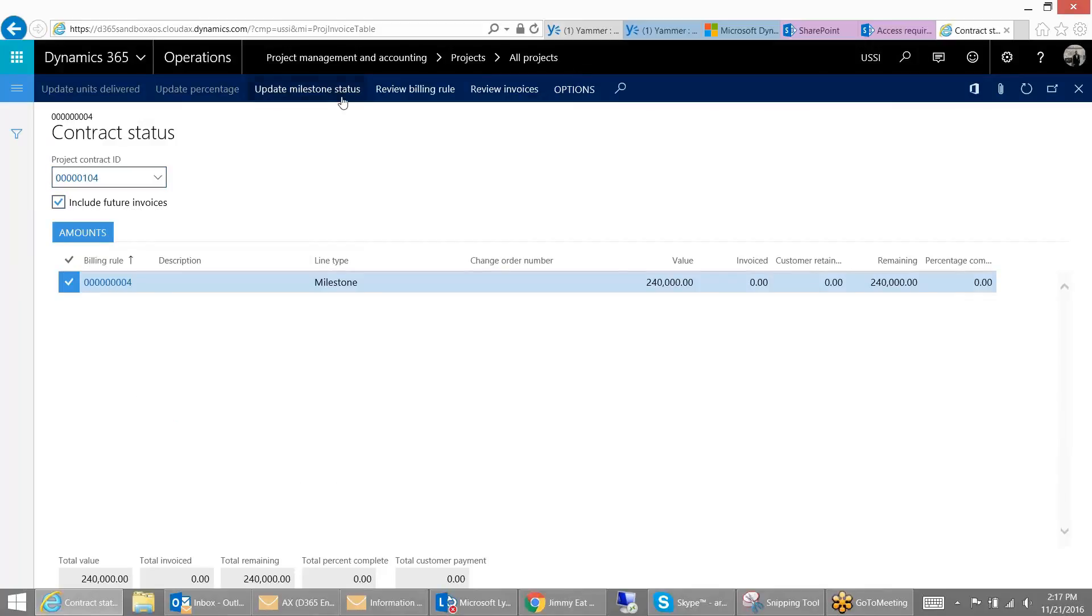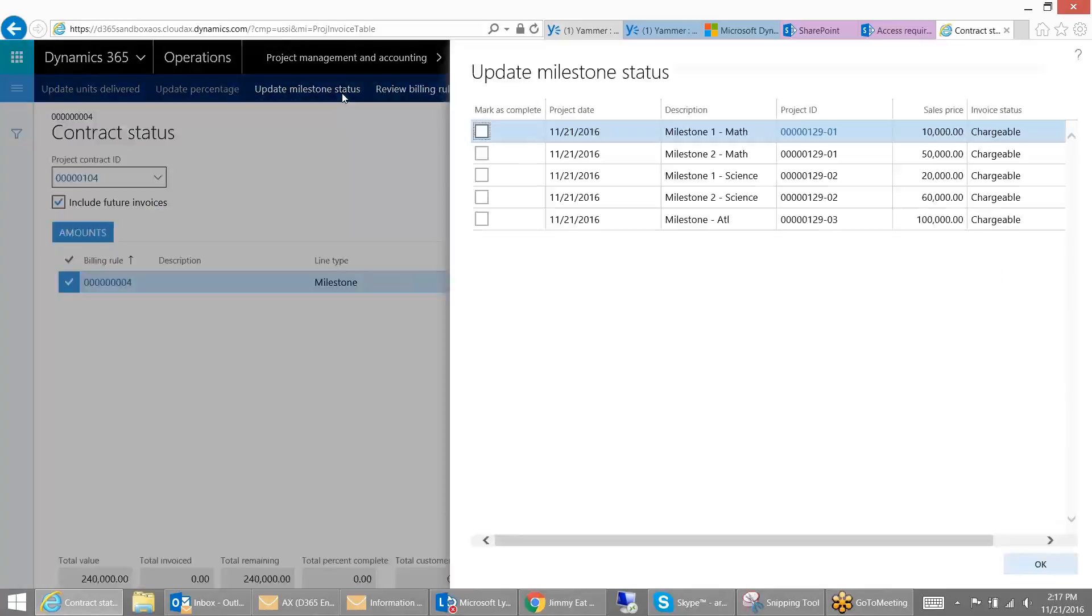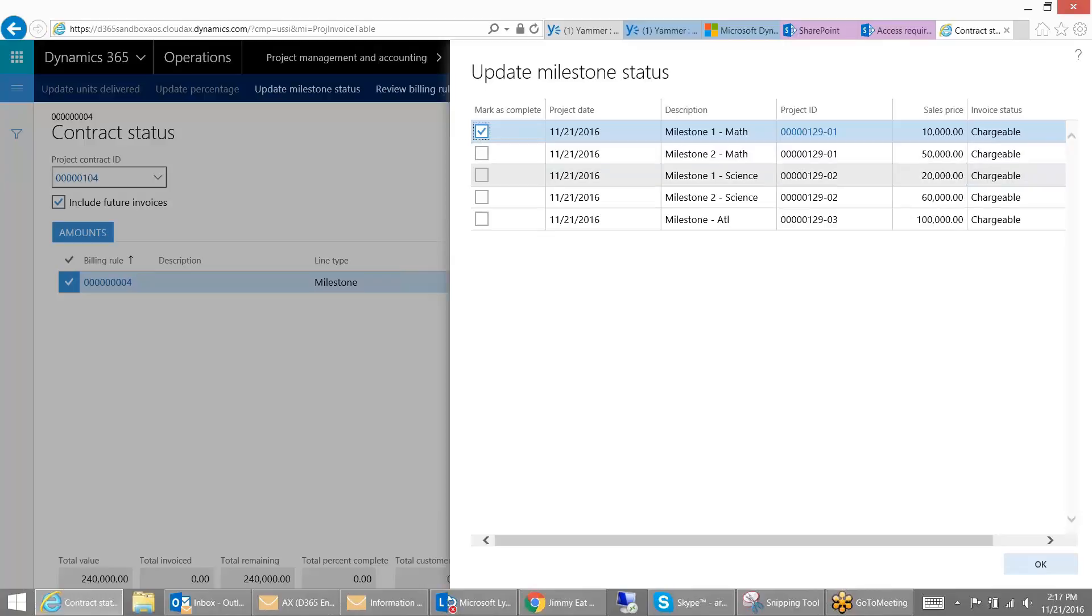This is a key form that we're going to see in a number of different places. What you can do, you select this and you can hit the Update Milestone. And then you can click in here and say, alright, which phases am I complete? Well, I've completed the first phase in Math. I've completed the first and the second one in the Science Building. So I can press OK.